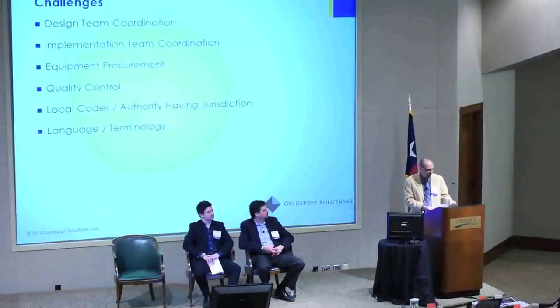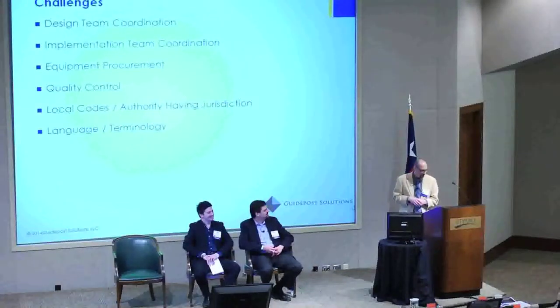Our third challenge is equipment procurement. Chances are the same problems that you have in the States with products will be the same problems that you have in another country. It'll just be expounded. It'll be bigger. So identify the troublesome products early on. Pay attention to long lead items: biometrics, revolving doors, turnstiles, locking hardware. I'm sure many people in this room have problems with locking hardware in the States. You're going to have the same problems in another country. Avoid any products that are not off the shelf. In the U.S., we use a particular alarm that you can't get readily in other countries. So pay attention to that.